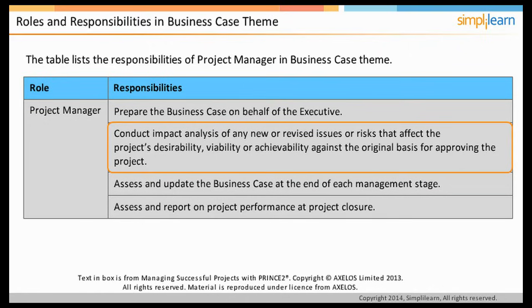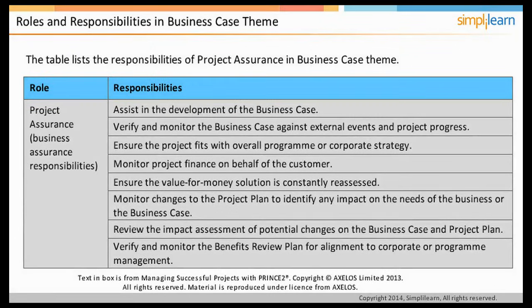Project manager also assesses and updates the business case at the end of each management stage and assesses and reports on project performance at project closure. The role of project assurance has business assurance responsibilities.